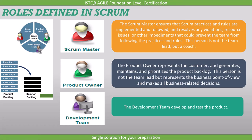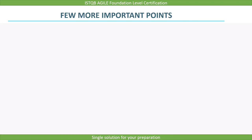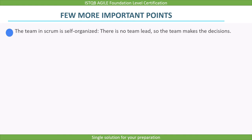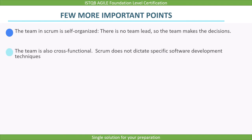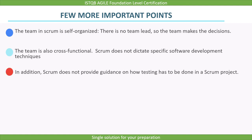Before we end this lecture, let's look at a few more important points. The team in Scrum is self-organized — there is no team lead, so the team makes the decisions. The team is also cross-functional. Scrum does not dictate specific software development techniques, and it does not provide guidance on how testing has to be done in a Scrum project. With this, we end the lecture here.